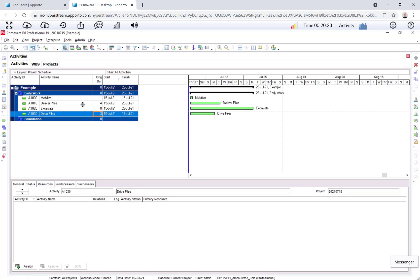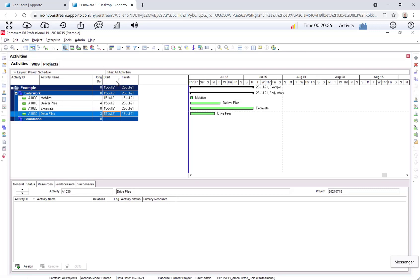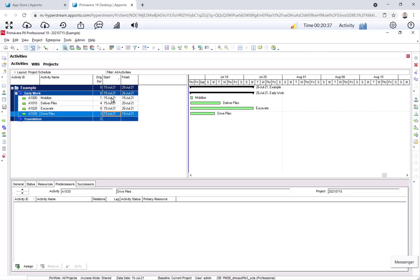Notice as I create these activities, after I can enter and be done with it, they're sorting themselves right now by ID, smallest to largest. It says here it's by start date, but they're all the same start date because the activities assume the earliest start date available, which is today.